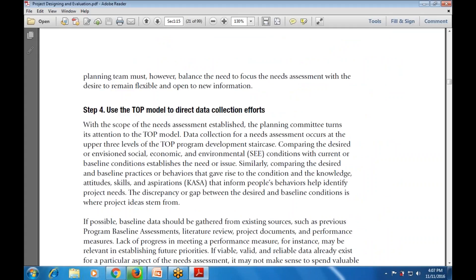Step number four is using the TOP model along with the CASA model - which stands for Knowledge, Attitude, Skills, Aspirations - and the socio-economic and environmental conditions with the current or baseline conditions. This TOP model is used to direct data collection efforts at three levels of the TOP program development staircase. Comparing CASA with the SEE informs how to identify program needs and any discrepancies.